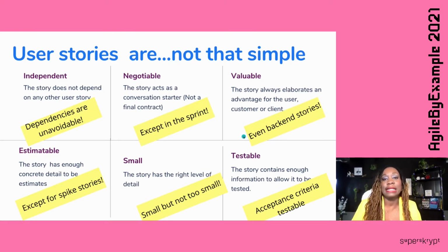What it means is you're going to remove the unnecessary dependencies, and you're going to attempt to write user stories that are not completely dependent on each other. So as far as you can decouple them, the better. The more decoupled they are, the better. It doesn't mean that you won't end up with a project that has one or two user stories dependent.